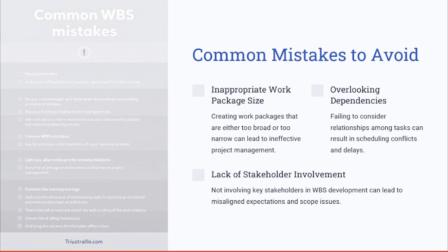Common mistakes in WBS development include creating work packages that are either too broad or too narrow, ignoring the dependencies and relationships among the tasks, and failing to involve stakeholders in the process. Avoiding these pitfalls ensures a more accurate and effective WBS creation.